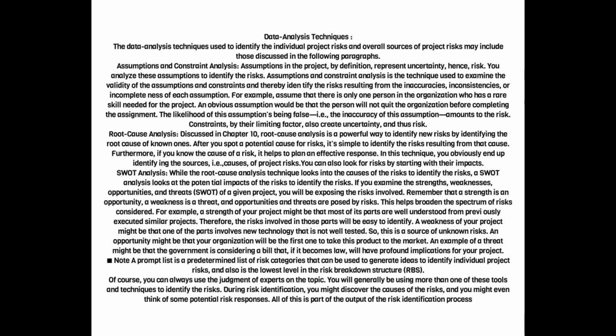Assumptions and constraint analysis. Assumptions in the project, by definition, represent uncertainty, hence, risk. You analyze these assumptions to identify the risks. Assumptions and constraint analysis is the technique used to examine the validity of the assumptions and constraints and thereby identify the risks resulting from the inaccuracies, inconsistencies, or incompleteness of each assumption. For example, assume that there is only one person in the organization who has a rare skill needed for the project. An obvious assumption would be that the person will not quit the organization before completing the assignment. The likelihood of this assumption's being false, i.e., the inaccuracy of this assumption, amounts to the risk.